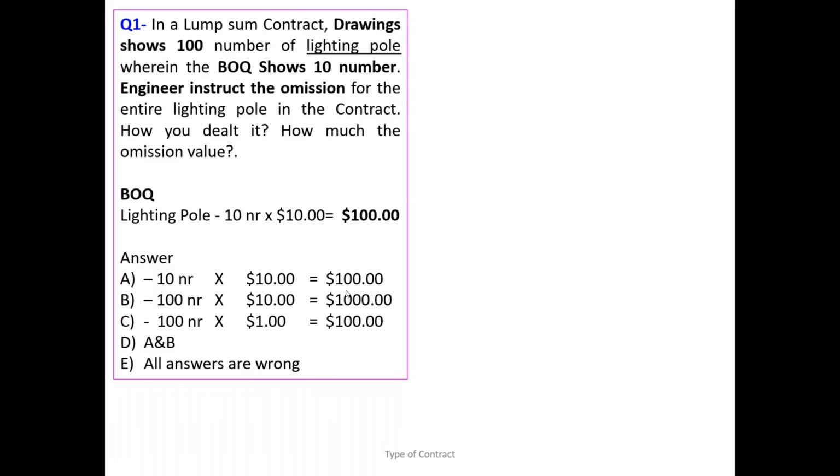Who bears the cost risk now? You agree the scope of work and you have given the defined price. It is the contractor's mistake. So both ways, the total sum cannot be changed. Do you understand? So you only do the right adjustment when you are omitting the work fully.